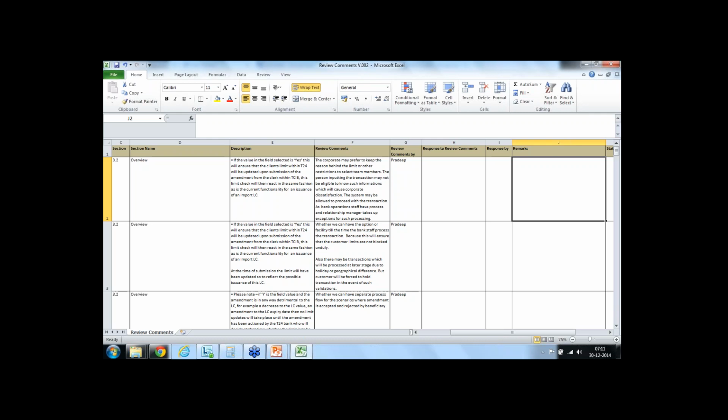When you started working on that project, and at one stage there are some changes coming in to the project or to the expectations, you need to have those changes officially, because you cannot accept them over a call or just a meeting. So they need to send a document called a change request.